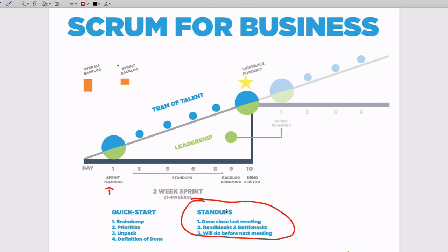So each person just answers, what have you done since our last meeting, which might be as recent as yesterday? What roadblocks and bottlenecks have you run into? And what will you get done before our next meeting, which quite possibly is the next day or maybe 2 days later? In a small business, it could be that having a stand-up every single morning is too much. But maybe every 2 days makes more sense, right? So it's about finding the version of Scrum that works best for you.